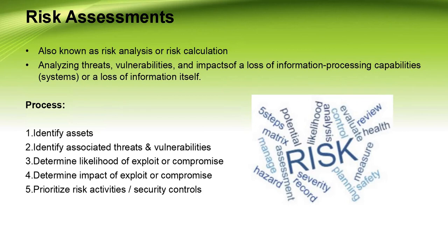In the next section I will show you different slides, so you can understand very easily. The response must be coupled with the likelihood determinants in the risk analysis. For example, the risk analysis might have advocated putting corrective measures in place as soon as possible for all high-level threats. Medium-level threats might require some action plans for implementation as soon as is responsible, and low-level threats might be dealt with if possible or simply accepted.